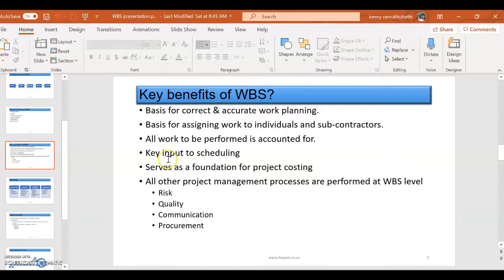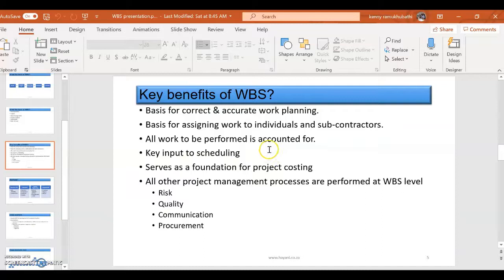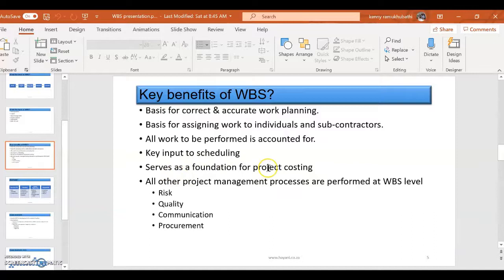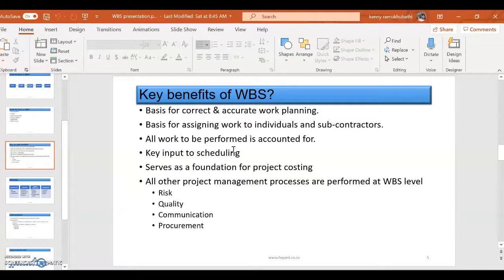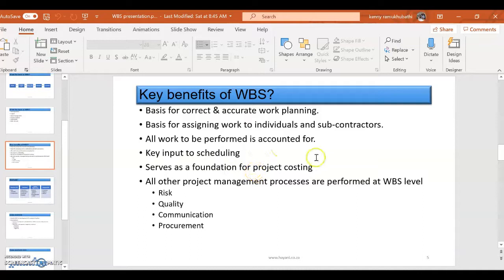This is a rule for Work Breakdown Structure - you must make sure when you're looking at the WBS, that whole tree, that it contains all the work that you're going to be doing. And then it's a key input to scheduling. As I said before, definitely scheduling is not accurate before you have your WBS. Whoever says differently, it's not true. So yes, you need to have a proper WBS before you can do work scheduling. Then it serves as a foundation for project costing. As I'm going to remind you, you've got Project Integration Management as the first knowledge area, Project Scope Management as the second one, Project Schedule Management third, and then the fourth one is Project Cost Management. So there's no way of costing before you can have scheduling, so the project costing will not be accurate if there is no proper scheduling, which is based on WBS as well.